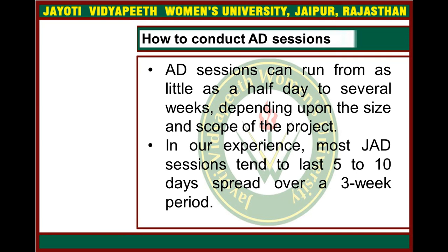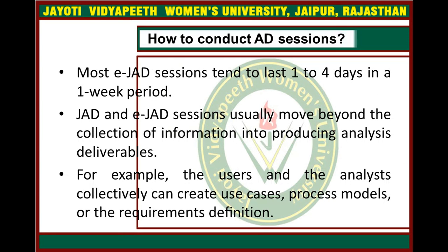So basically the reason behind conducting the session is how to implement that thing. In our experience, most JAD sessions tend to last 5 to 10 days spread over a 3 week period. It all depends on the situation and the task. Most e-JAD sessions tend to take 1 to 4 days in a 1 week period. It all depends, as I told you.